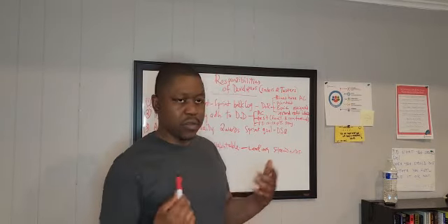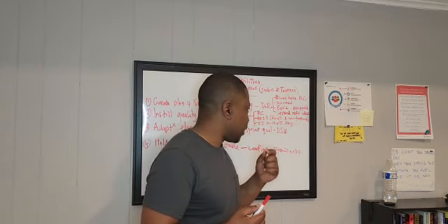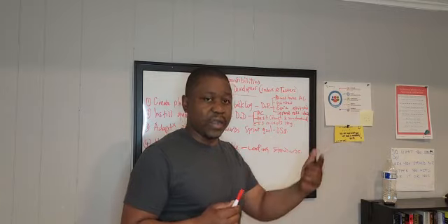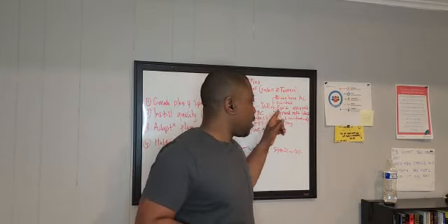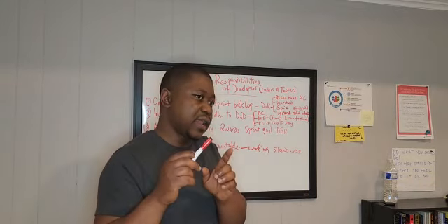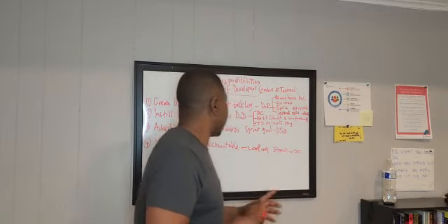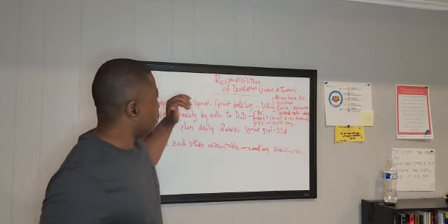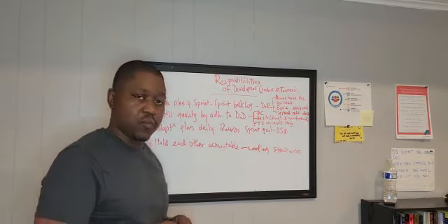Especially if you're using a tool like Jira, you should make sure that each user story is linked to its epic. Then all the dependencies and risks associated with each of those stories to be done within that sprint should also be identified. So that is the developers' responsibility as far as creating the plan for the sprint is concerned.